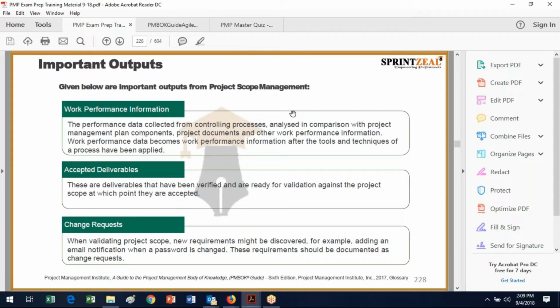So, for instance, I could say it's 85 degrees in Houston, and you might think, that's not a bad day, because that's just raw data. But then you say, well, it's tremendously humid, so with the misery index, it feels like it's 93. In which case, you think, okay, it's not such a nice day. So the work performance information is the result of some kind of analysis or conglomeration of data such that the raw data now has meaning. Because data is just data until it becomes information.